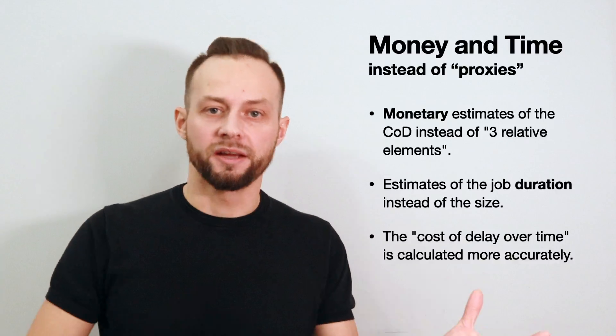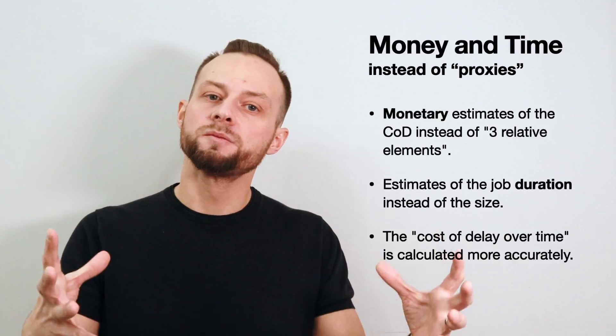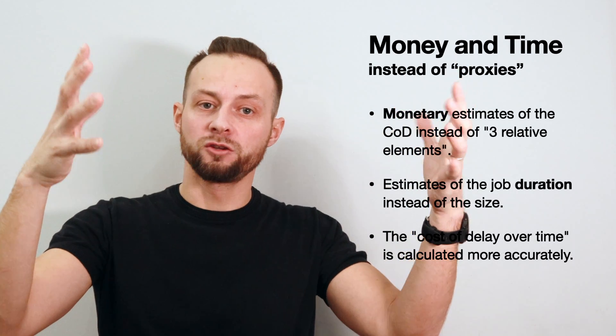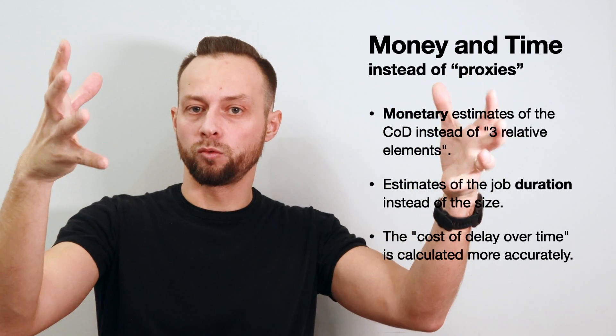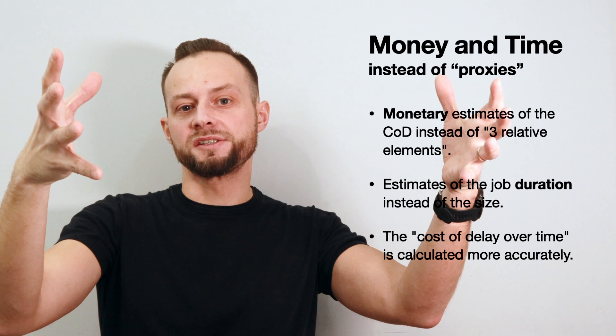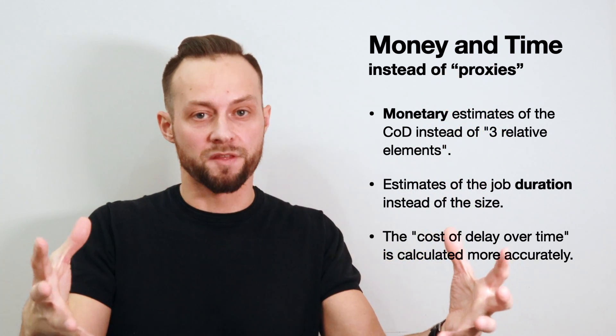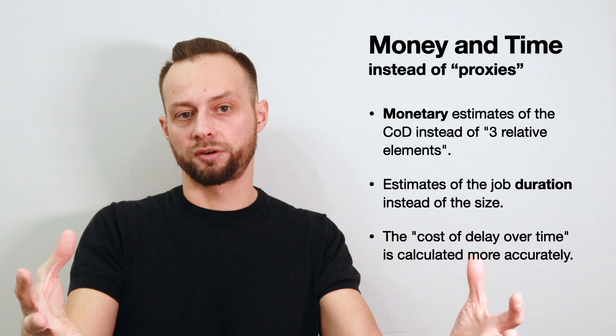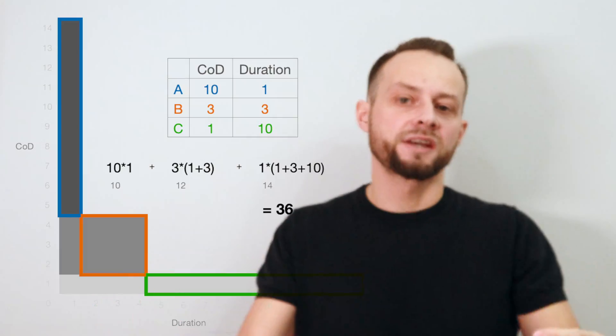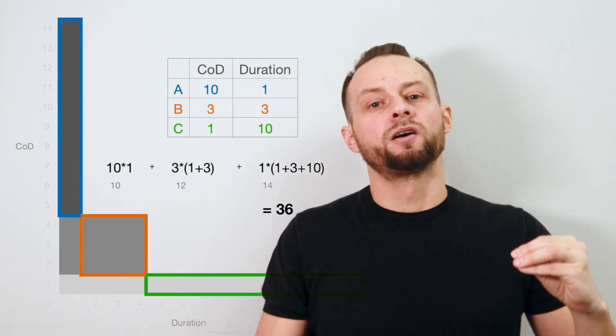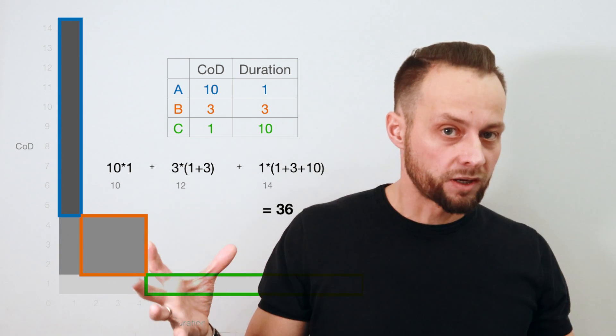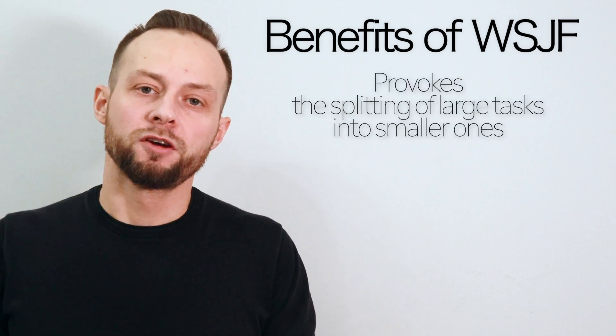In this procedure, the three CoD components and job size are substitutes for money and time. If you have good monetary estimates of the CoD, use them as the numerator. If you have good estimates of the duration of work, use them instead of the size — in this case you apply the idea of cost of delay over time more properly.